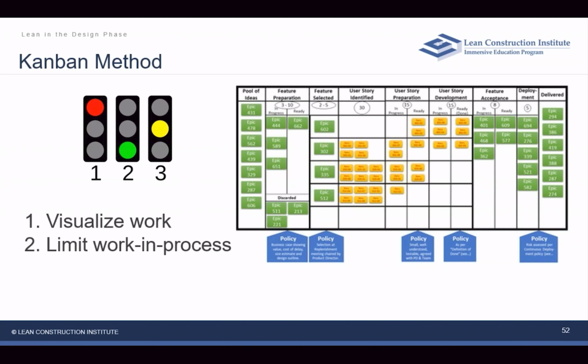So they limit WIP. And up here on the top they'll have circles, and a column might represent a process step. This is just stolen from the software folks, but I've got an example that I'm going to show you of how I'm applying it to a trade contractor's engineering and design group, where we limit the amount of work packets that can be in a particular column.